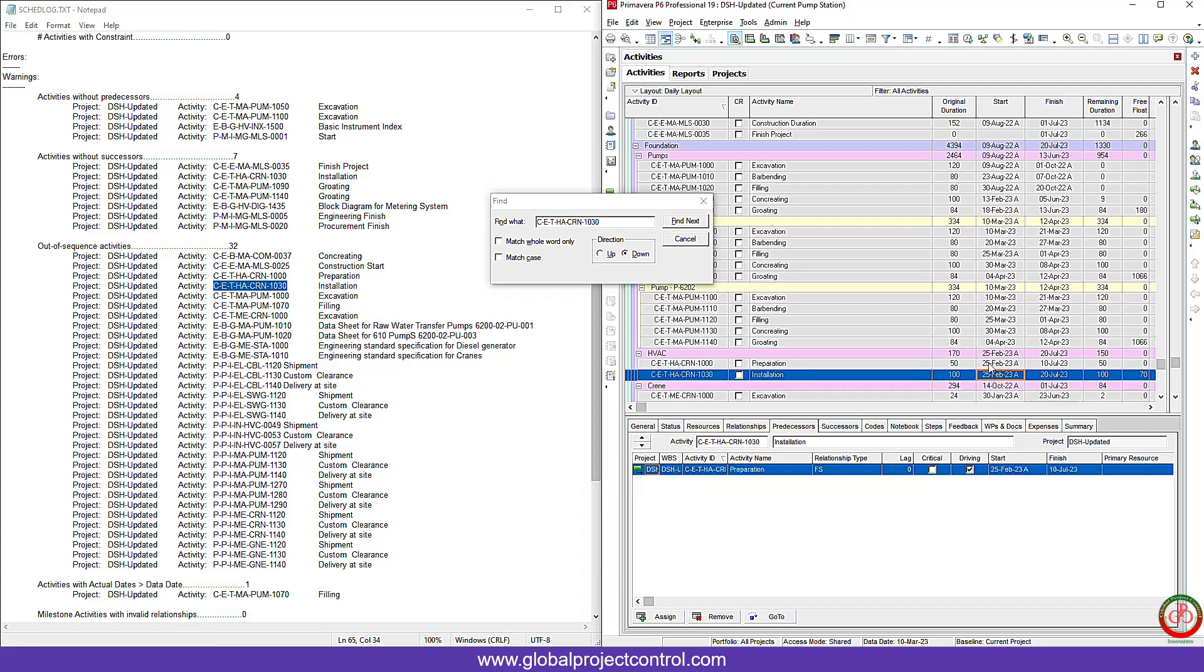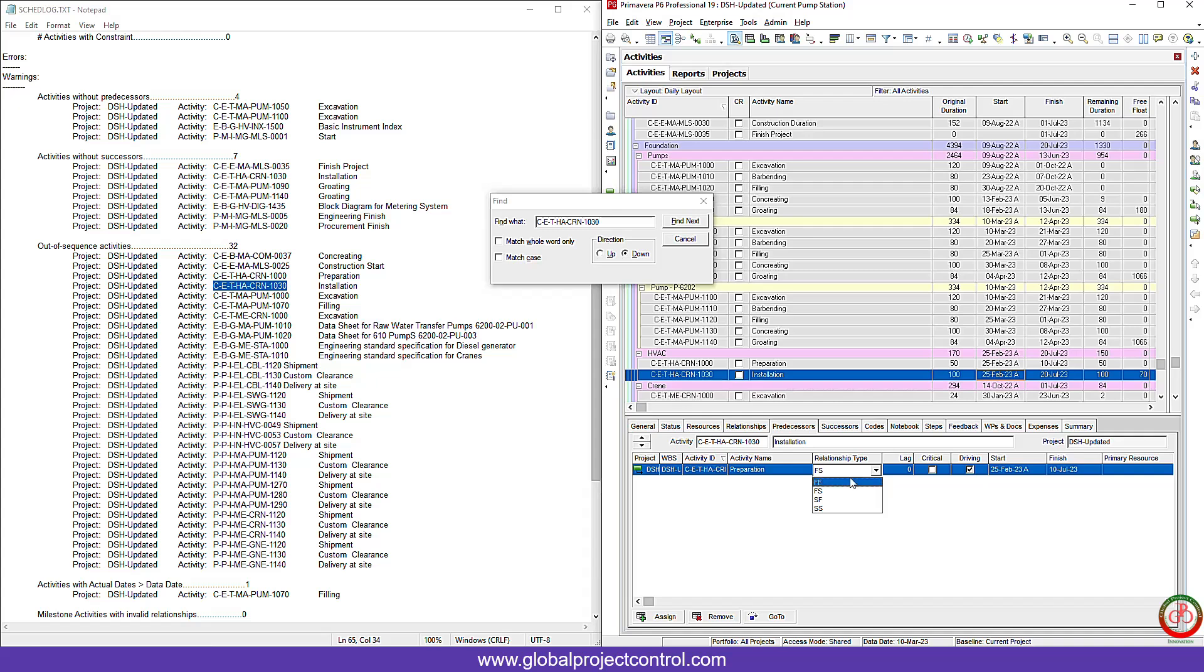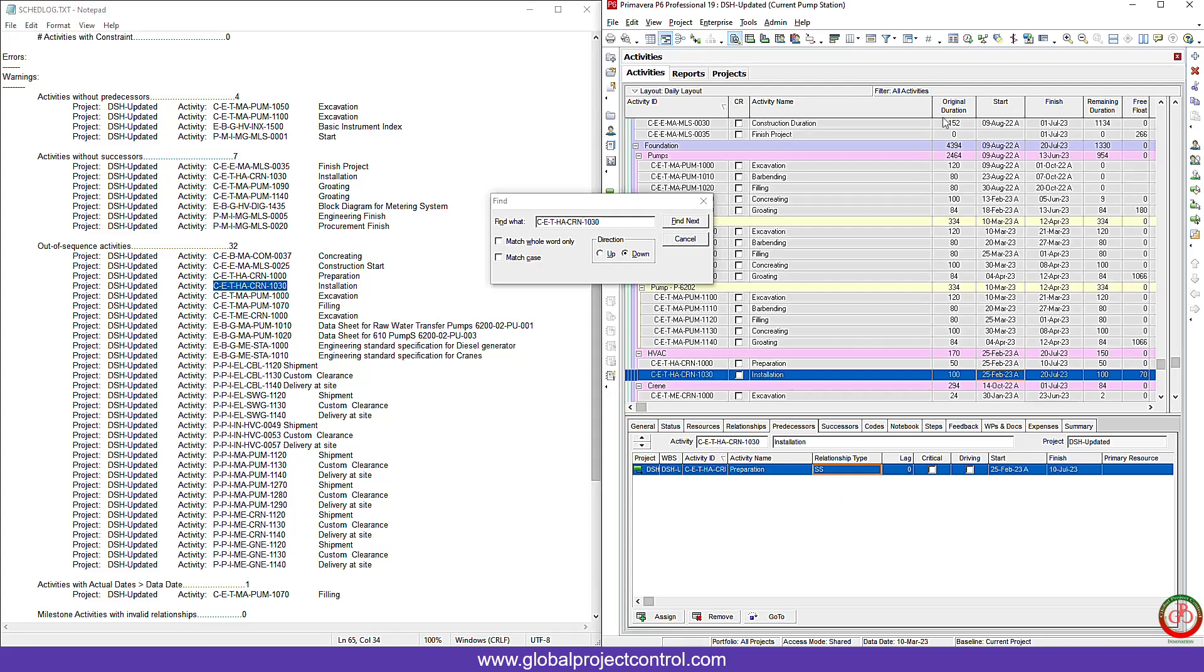In this case, this relationship time will not be valid and I need to update it. How? You can update it based on the logic which one works for you. We have the replacement or the finish to start to be changed on the start to start or finish to finish based on your required logic fixing. Over here I try to update it with the start to start relationship type.